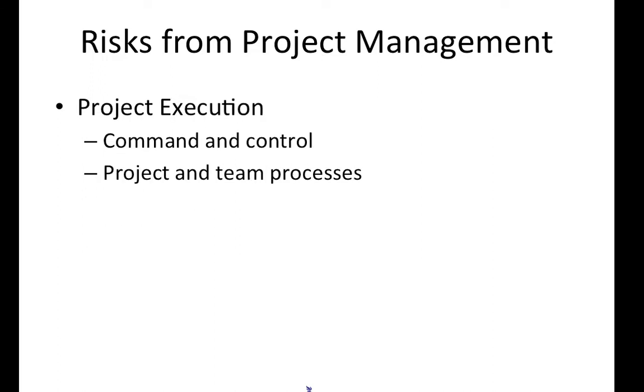Then we have the risk from project execution. This is the command and control, or the leadership structure. Who has the authority and responsibility for doing various parts of the project? It becomes more of a risk the larger and more complex the project becomes, because more people and critical jobs become involved. There are risks from the leadership roles, time demands, and capabilities not well understood. There's also a need for monitoring, especially the milestone reviews at critical points. We use tools like earned value analysis for this.